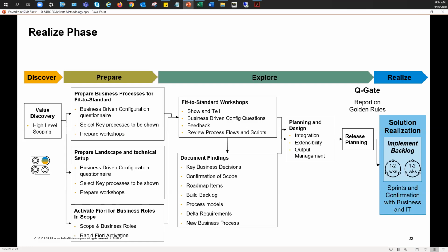In the realize phase, you are configuring the development system, or the term that's also used interchangeably is the explore system. So you're configuring the exploration system or the development system to test those pre-delivered functionalities, custom configurations, custom development. If you choose to set up a system based on a model company, you can have a direct setup approach, which is deploying the model company best practices directly in the exploration or dev system.